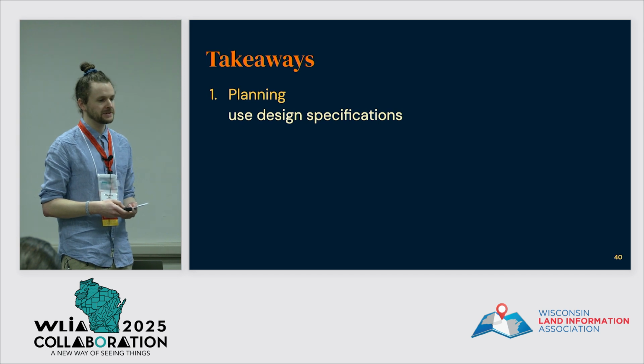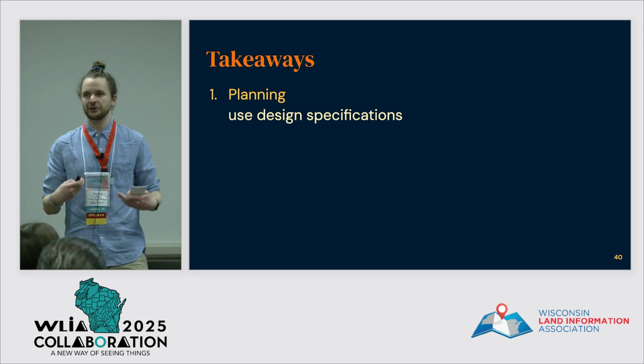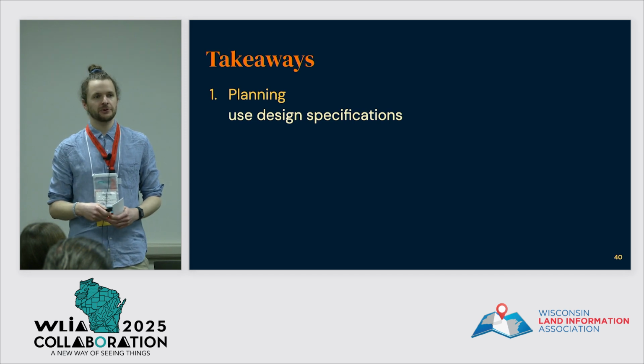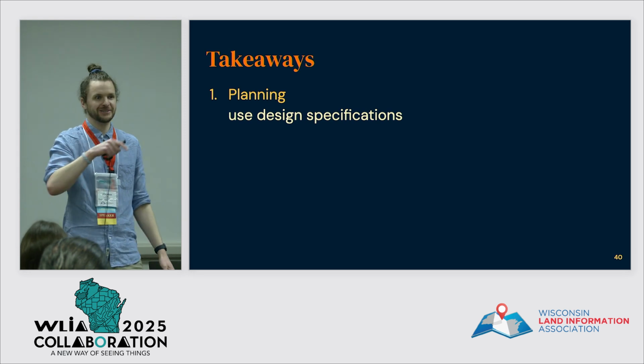I think one good reason is, at least for myself, scope creep. Not only are you defining in your specifications what you want to do, it also is implicitly telling you what you don't need to do.